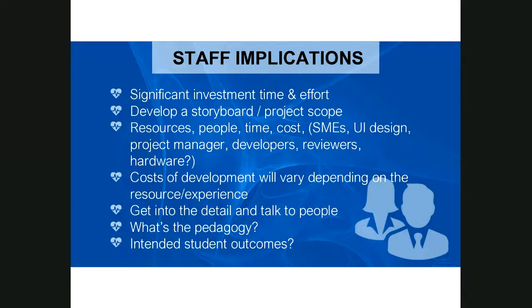Particularly, the cost of the development will vary with experience. So we were working with a vendor who probably had not done something as complex as this before, and we had to get them to come in to visit us in the school so that we could explain exactly how we wanted the animations to work and how to synchronize them. So that showed that it was very important. You might document things, but it's not till you get down to the nitty-gritty of maybe even colour or shape of things that needs to be done.